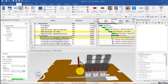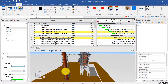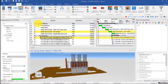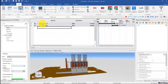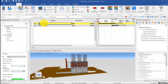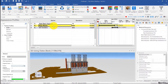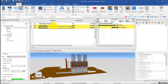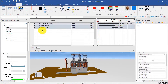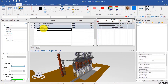So let's see what we have so far — we just have this structure and then this tank left, so let's start with the structure. I can collapse those, and then maybe air cooler and pipe racks are part of the same thing. So I can use Ctrl+I to add a task above and call this pipe rack package, and then use these two activities and indent them using the Alt+Right shortcut. Now I can type main structure.